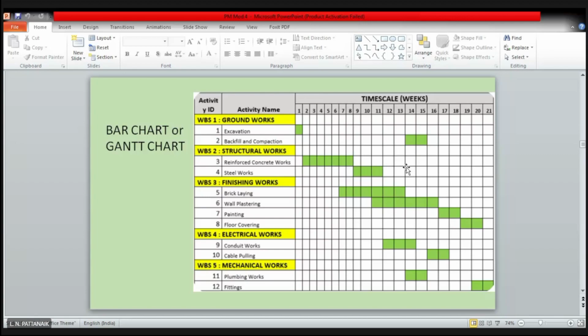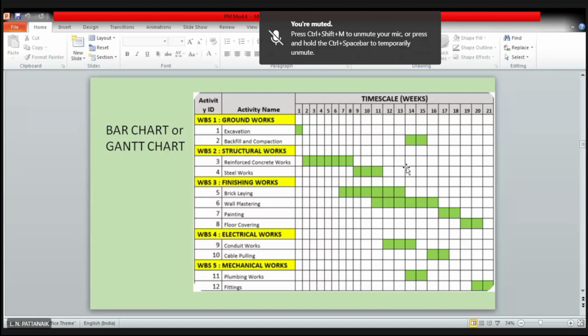So whenever some activity gets delayed, or completed prior to its completion time, either way it is going to affect the subsequent activities, and it is very difficult to make changes in an already constructed Gantt chart because it will become clumsy, or not easily readable, if we make a lot of changes into it, right?